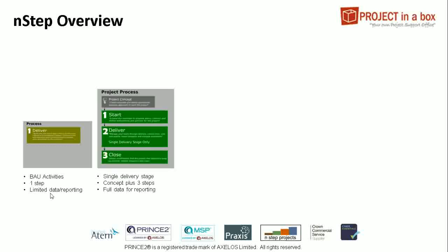Then we come to the 3-step method. This is the first what we consider to be a real project. It's a single delivery stage, so we've not got multiple deliverables here, and that's what allows it to be a simple start, deliver, close activity. We do include a sort of pre-project step, which is project concept, where you might be going through and identifying whether the project is worth doing or not, and many organisations have that sort of activity.